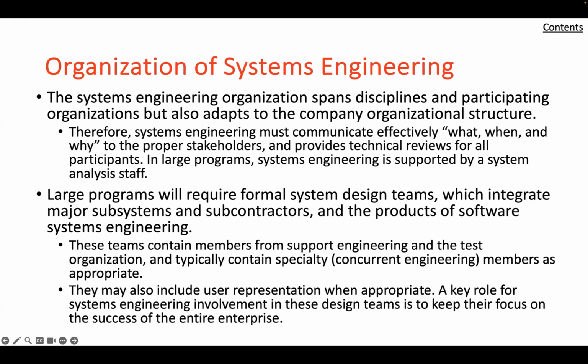This needs to be carried out at two levels: one, periodic program management reviews attended by top-level representatives of the contractor team, and two, frequent technical coordination meetings concerned with specific ongoing aspects of the program. The principal leaders of the system design effort must have a regular and frequent means of communication with one another to keep the program closely coordinated and to react quickly to problems. This is discussed next in the following paragraphs.